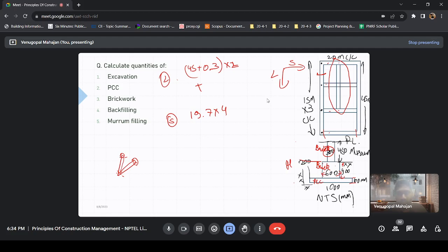See, the mathematical formulation we have used is the width at that point, right? So if we are talking about PCC, you would see that the width is different. So the individual calculations of long wall and short wall would be different, but the sum would be the same.